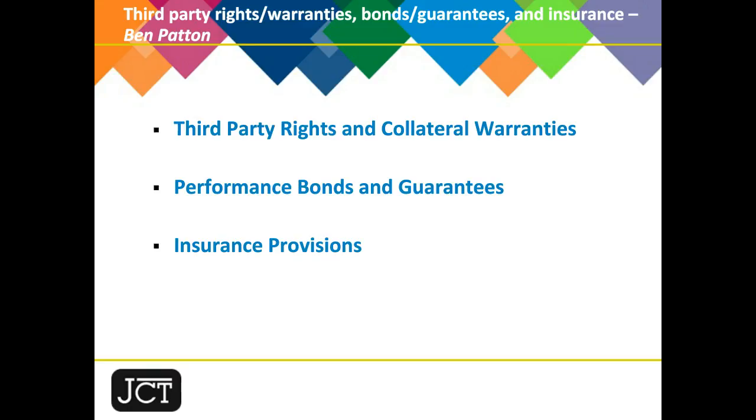It should be noted that under clause 7.4 of the main contracts, or 2.26 of the subcontracts, the default position in relation to a failure to specify whether rights are granted as third-party rights or by collateral warranty is now that the decision as to the mode of grant rests with the contractor or the subcontractor and not the employer.